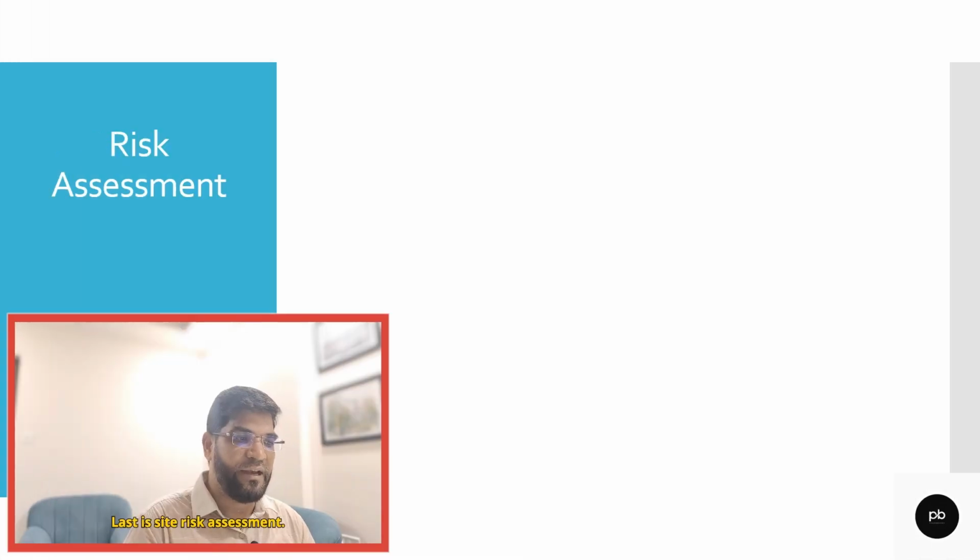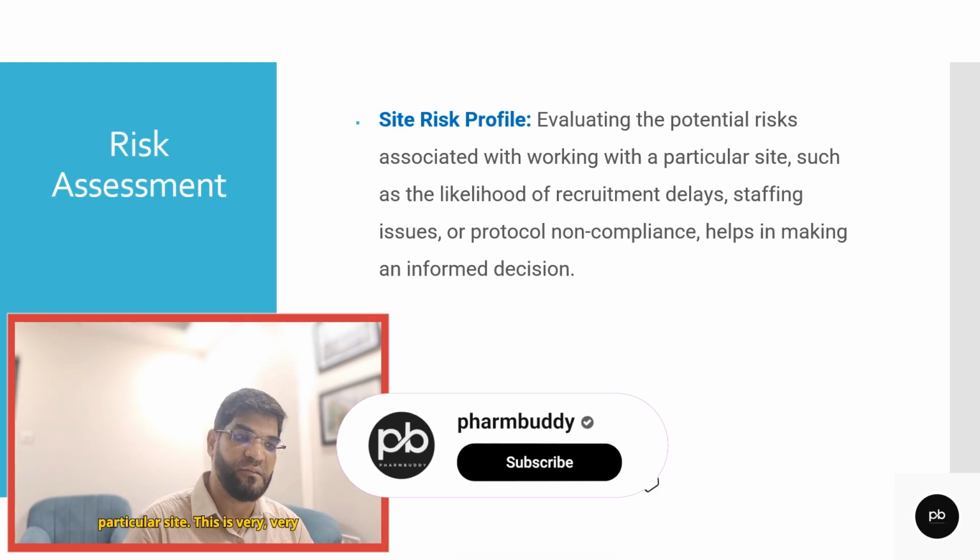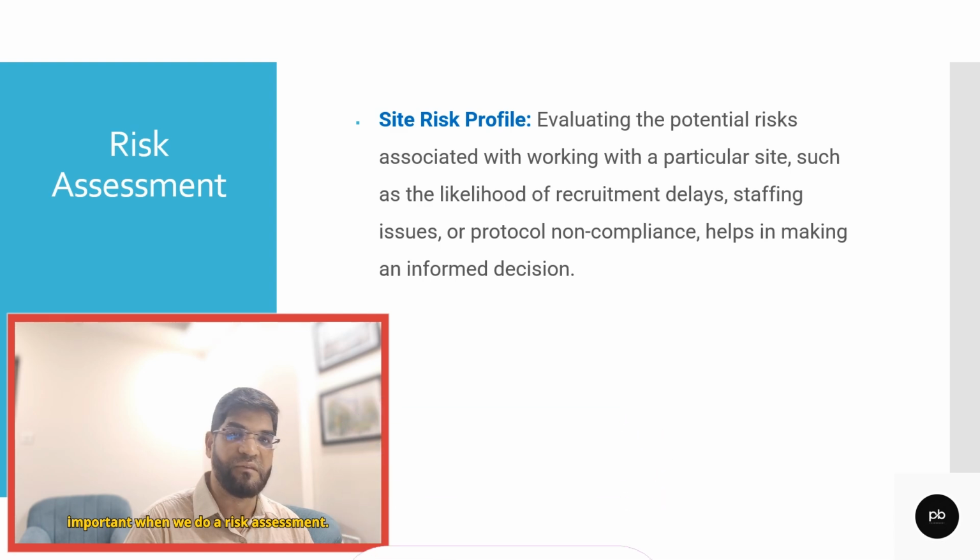Last but not least is the risk assessment. So evaluating the potential risks associated with working with a particular site, such as likelihood of recruitment delay, staffing issues, and protocol non-compliance, helps in making an informed decision. So what are the possible risks associated with a particular site? This is very, very important when we do a risk assessment. So these are certain factors which a sponsor company would like to assess in the site feasibility study.